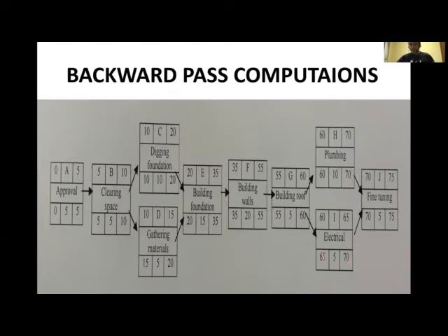Then to find this is 70 minus 5. You get what? 65. Okay. To find this, you do 70 minus 10. That's 60. Now, this is a merge. Remember, if you're going backwards, you go for the smallest as opposed to the biggest. So if you compare 60 and 65, 60 is the smallest. That's how come it has come here. All right. So you keep on.